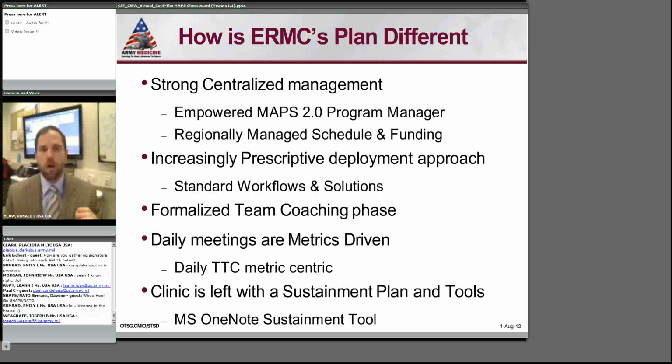So our increasingly prescriptive approach has been a big win. Additionally, and I mentioned this earlier, we've added a formalized team coaching phase into the MAPS 2.0 deployment. You'll see that when I get to the plan in the next slide. But basically, for our first week of MAPS 2.0, we do no training. In fact, for our first week of MAPS 2.0, we do hardly any talking.